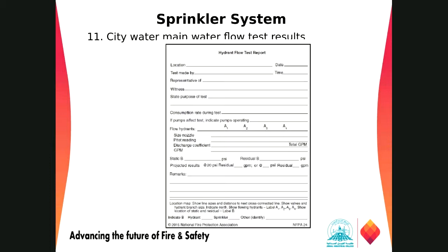So this is a simple report of a hydrant flow test. We have to use the same form for doing the flow test for our project. And if you have this report, keep in mind it should not be older than 1 year, because if it is older than 1 year, it is not valid for review. We have to go for an additional hydrant flow test for your project.